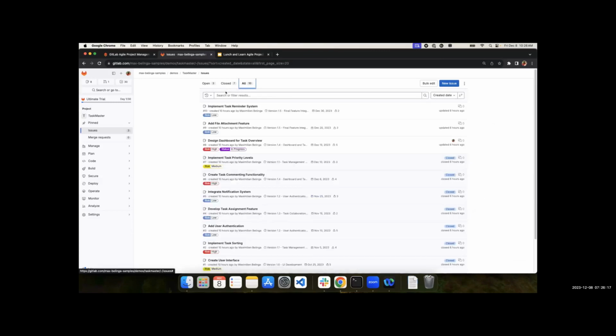Product owners or project managers can use GitLab to articulate business and customer needs, prioritizing them within a backlog to communicate urgency and desired development sequences. Issues created without an associated milestone serve as the product backlog, aiding in tracking tasks. So whenever you create a new issue, this is what we can call our product backlog.